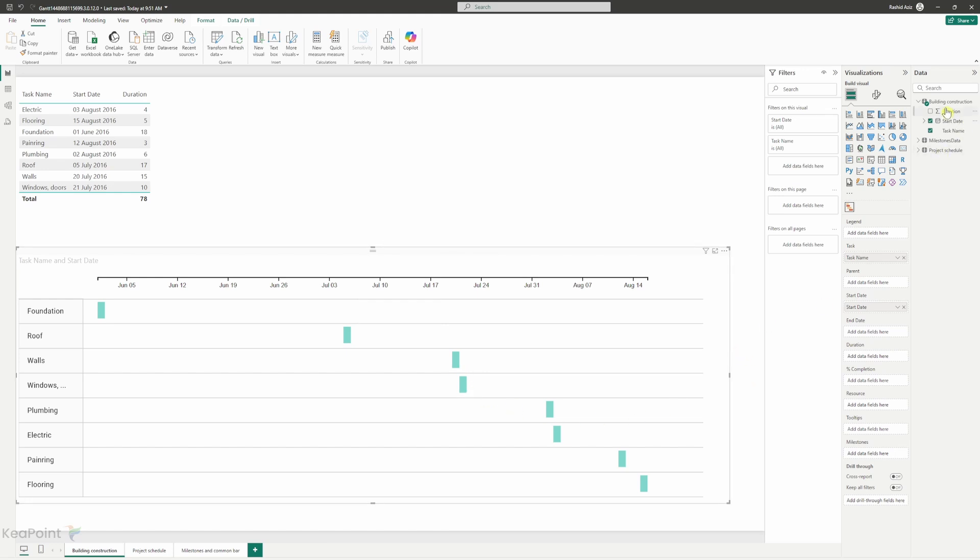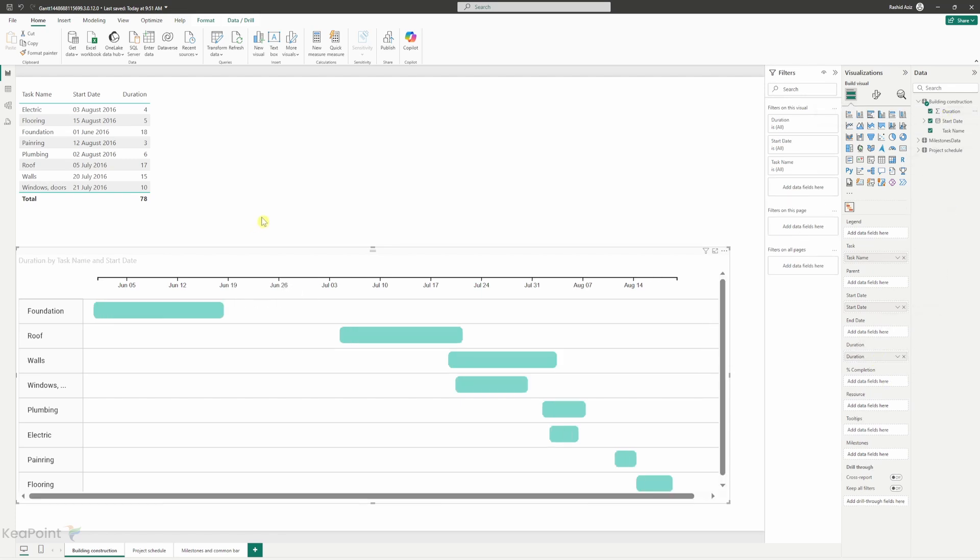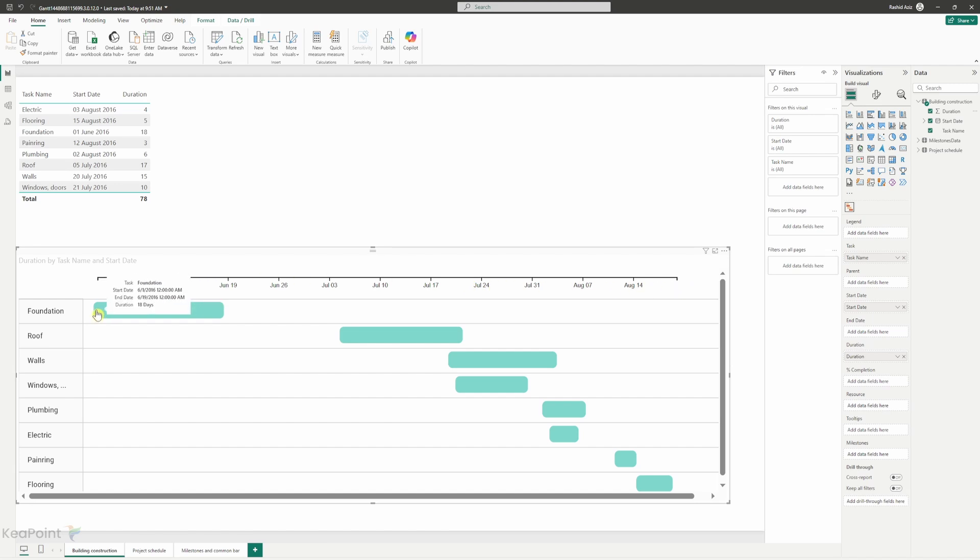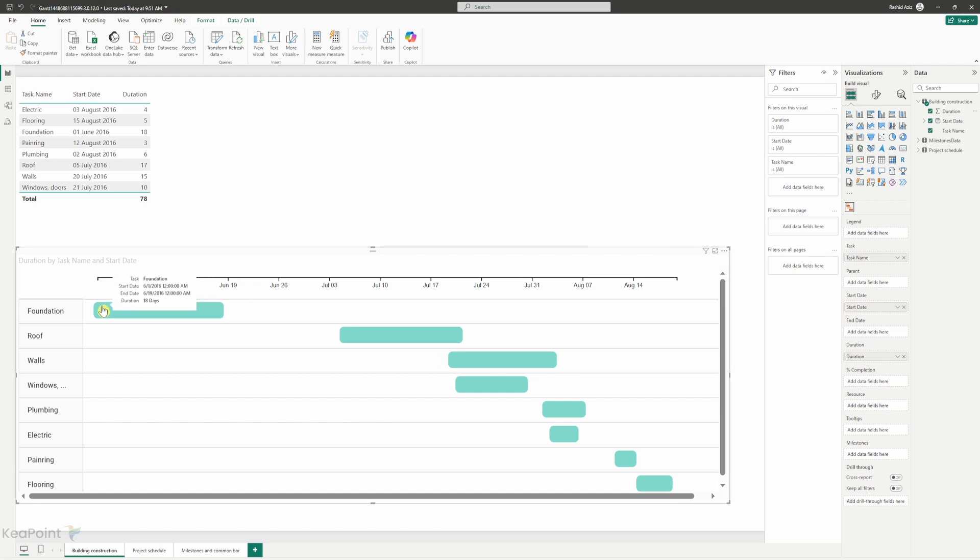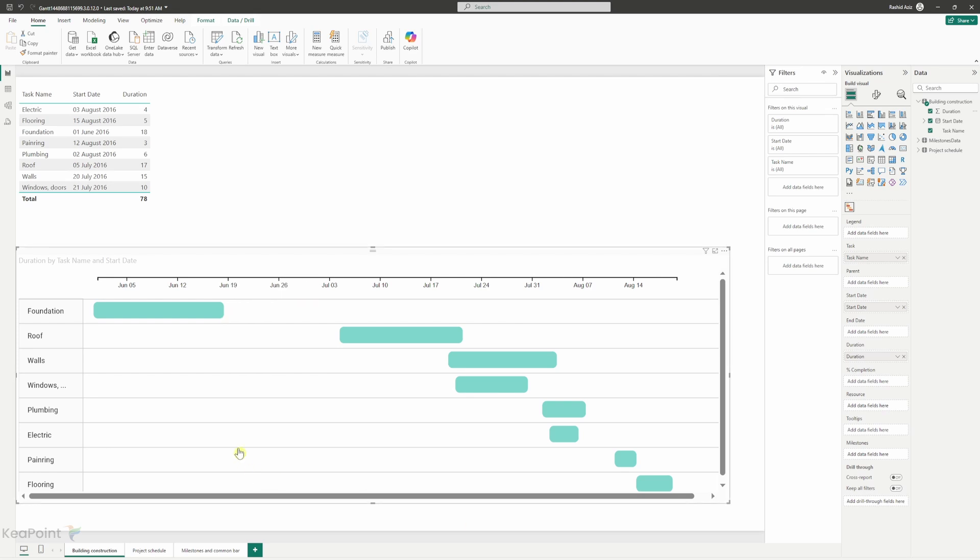Next I can select the duration and then drag it under the duration column. This will tell me the duration of each task. So we can see the task title here. We can see the date timeline there and then we can see that this task is 18 days long and it is starting from the 1st of June and ending on the 19th of June. So this is a very simple way to produce a Gantt chart based on just the task name, start date and duration.